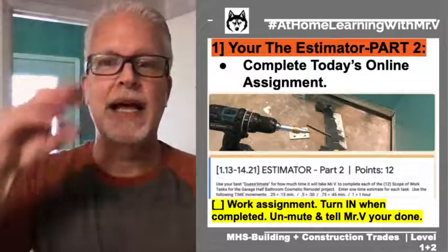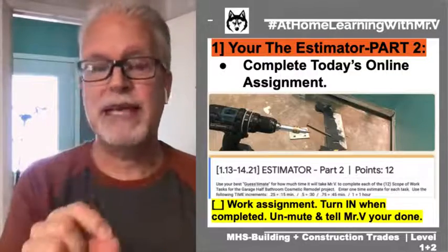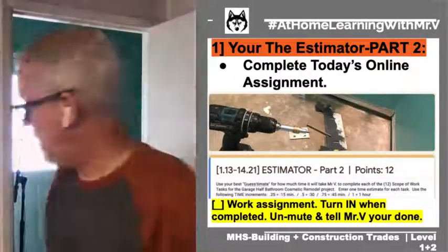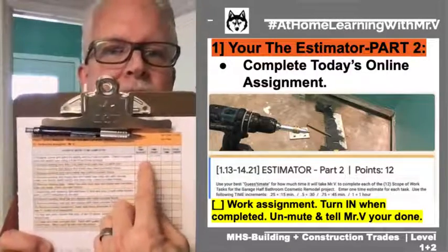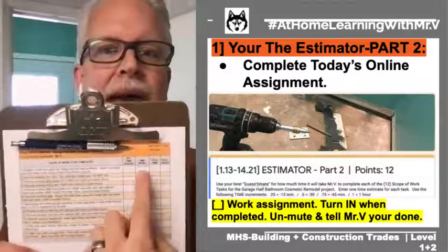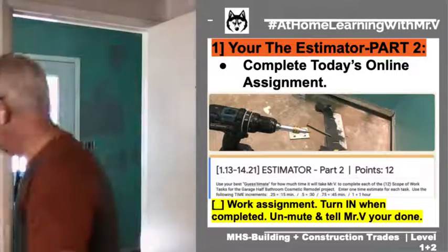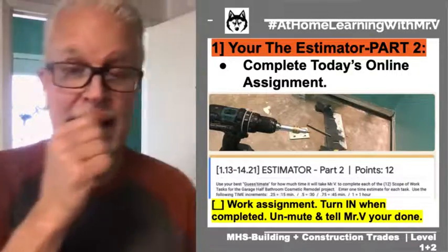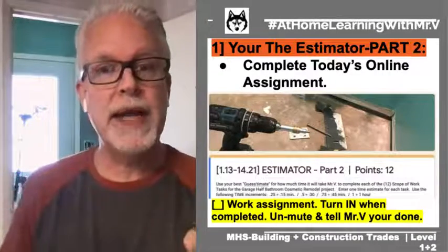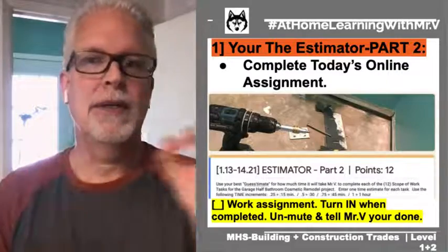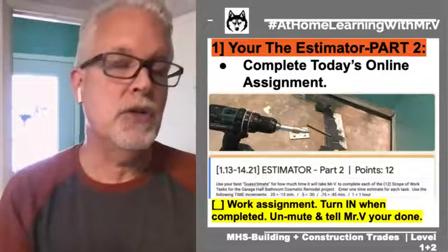You can see in the instructions there, I want us to use decimals. And I'm going to say this again. We're going to use decimals to represent how much time you think it's going to take. Because what you're going to see is the time estimates are going to flow back into our chart, and they're going to do basically an auto addition, and it's going to add up and give us our totals. So I need you to use no smaller increment than 15 minutes. So if you say it's going to take an hour and 15 minutes, it's going to be 1.25. And that's all you have to type into your answers in your Google Classroom, okay?